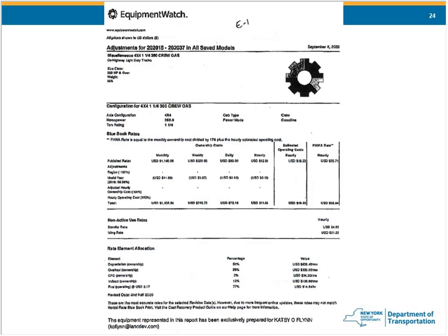Equipment sheets, labeled nice. One thing I want to mention is that for agreed prices, you're using the FHWA rate, which is all the way to the right-hand side and also non-adjusted. So we're using that FHWA rate hourly top number. I can't quite read it, it's like 2571. So that's the FHWA rate. You'll put it in the Merc 26 for this piece of equipment, multiplied by the hours, gives you the total reimbursement for the agreed price on this piece of equipment.